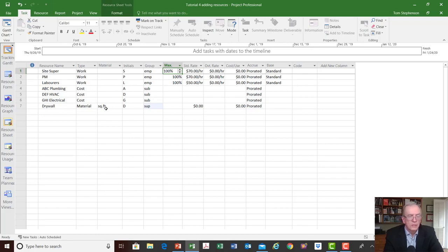So we're going to say the site super is 100%. That means the site super is 100% on this project. We're going to say that the PM is 50% on this project. What that means is that at no time should this project manager be taking more than 50% of their time on the project. Really, it works well when you're assigning somebody to the whole project. Maybe the project takes 3 months and that project manager is looking after 2 projects, and you figure they're going to be 50% on this project and 50% on another project.